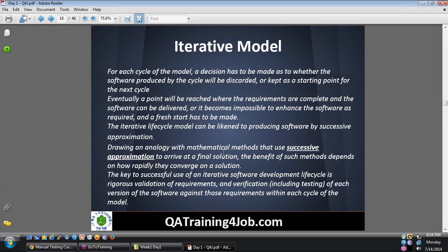That gives an advantage. Now, are you spending more budget on this? It's possible. Like if your waterfall model is 1 year, and in the iterative model you do 3 or 4 iterations of approximately 3 months each, it's coming to the same stage. But what if you capture all the requirements correctly in the first or second cycle? It will be done in 6 months. So you saved 6 months of your time. That's the advantage of the iterative model. Okay.